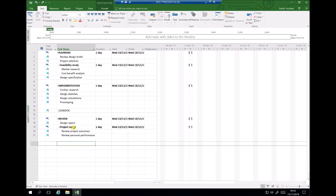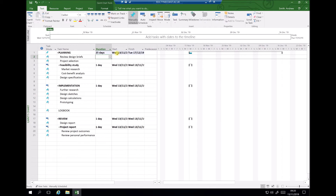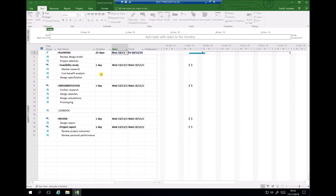Now we can begin to consider our schedule. If our project is due to last 18 weeks, we might want to spend five of those weeks in the planning phase. On the Gantt chart on the right-hand side, Saturday and Sunday are greyed out as non-working days. The duration of five weeks is 25 working days. I'm also going to change the start day to Monday the 18th — the coming Monday — and we can see our Gantt chart updates accordingly with the planning overarching task running for five weeks.